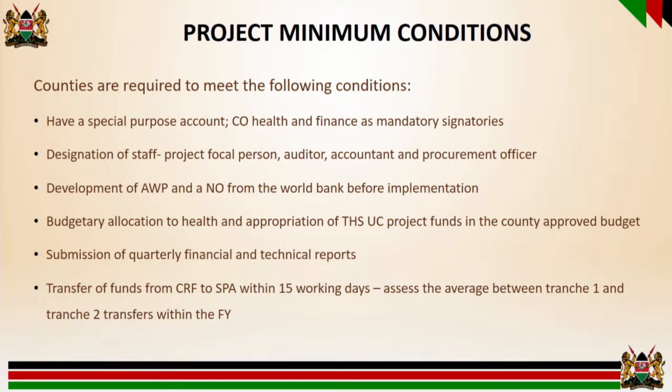Then, of course, submission of quarterly financial and technical reports, and also transfer of funds from CRF to SPA within 15 working days. So once the funds hit the CRF account, you are required under the project to have these funds moved to SPA within 15 working days, failure to which there were penalties that were being applied in the next financial year.